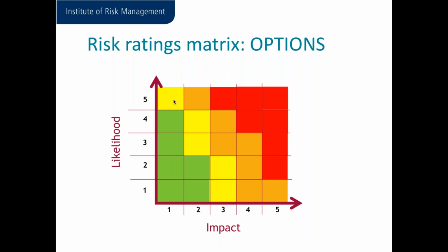Hilton and Simon consider this a lot in chapter 6 of the ATOM methodology book, and that's on page 74, where they talk about weighting. I don't know whether any of you come from the charity sector, but the charity sector also use weighting, and if that's the y-axis and this is the x-axis, they do y times x plus x, so that gives the additional weighting. So there are different ways of doing that, but it helps you think about which is the most important, and quite often people will want to know a little bit more about the impact.